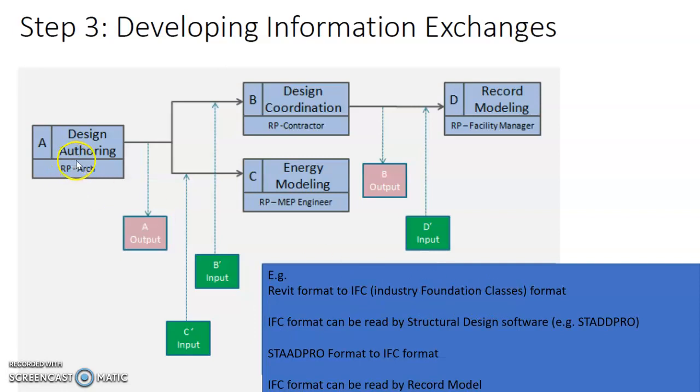If this design platform, or whatever BIM modern platform, is able to give the output in IFC format, it will allow the information to be fully uploaded as an input into the next software platform. The output of that platform also needs to be in IFC format, or at least compatible with the next model, so that it can serve as the input into the next model.